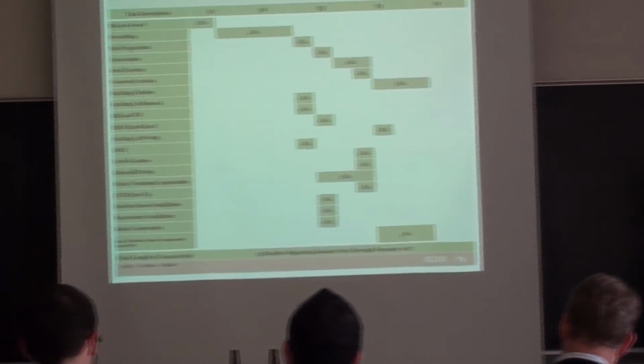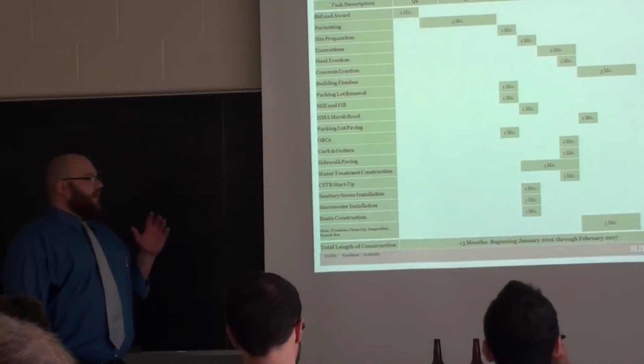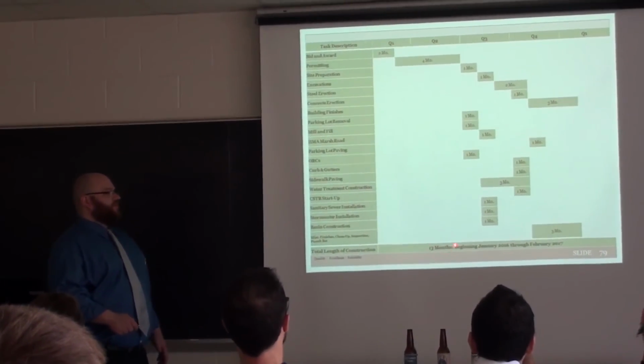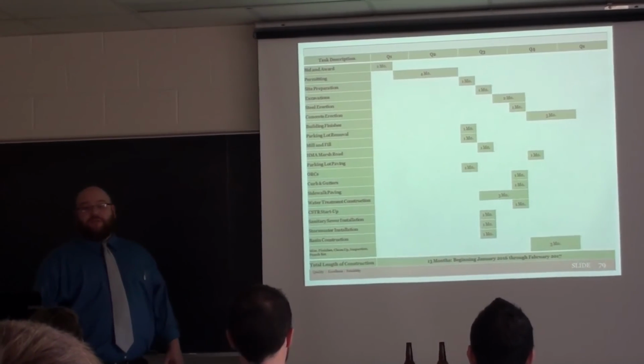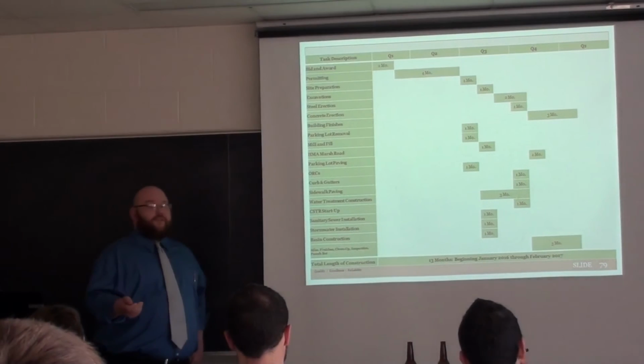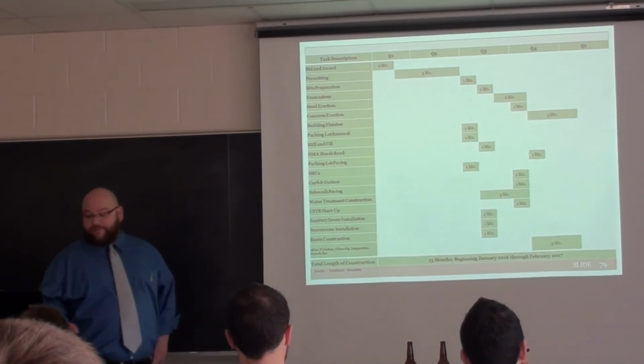So we finally come down to the proposed construction schedule. If you notice, we are proposing a very aggressive construction schedule of 13 months, which we plan on beginning January 2016 and ending in February 2017.